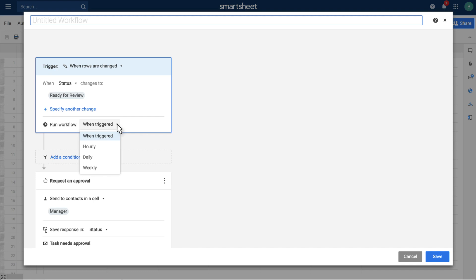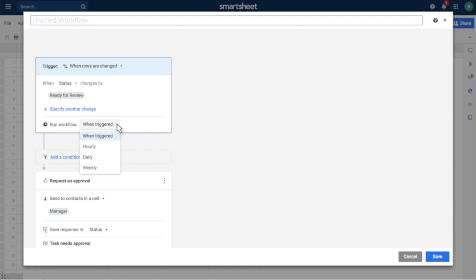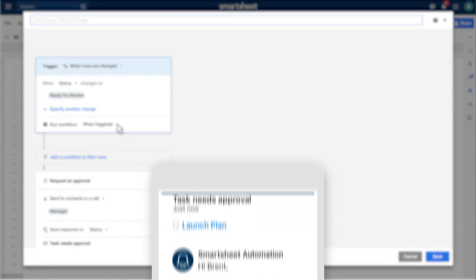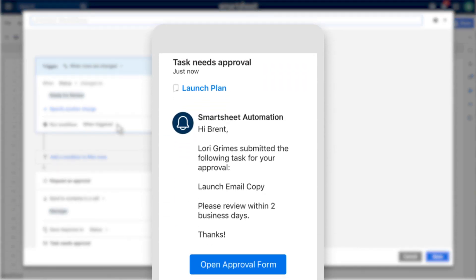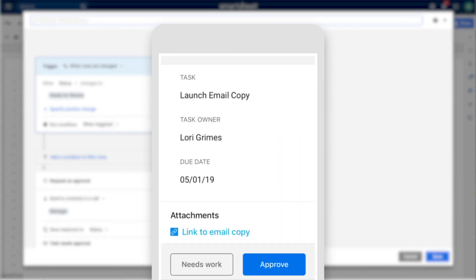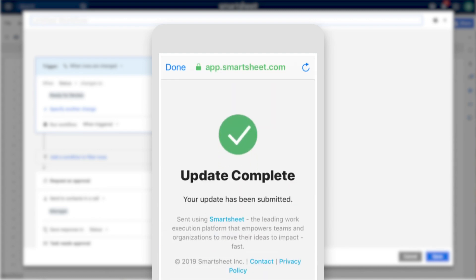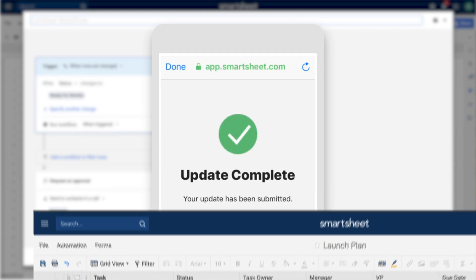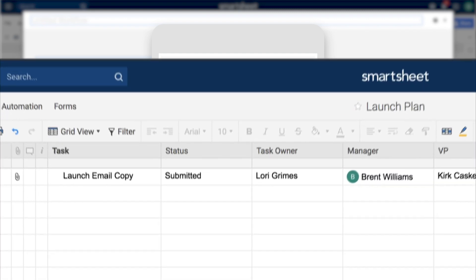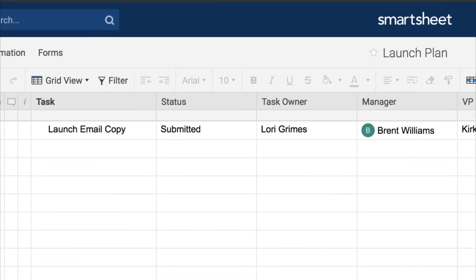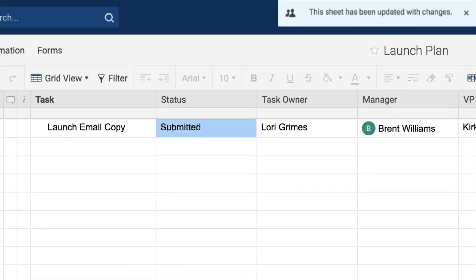Approval requests are mobile ready, so stakeholders can respond on any device. The approval status column will tell you when a request has been sent and also record the approver's decision.